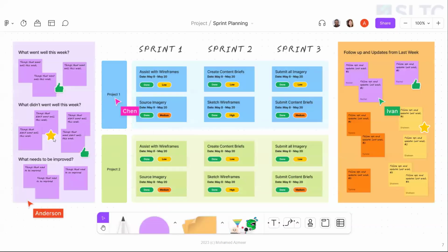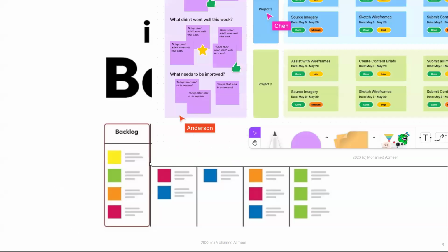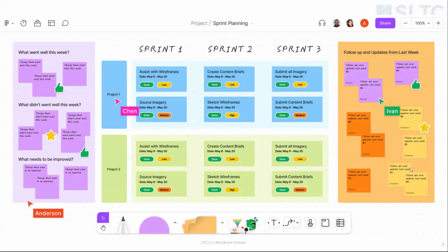Now, when it comes to backlog to to-do, okay, so these two, jumping from backlog to to-do, this is kind of a story that we work on. So what you can see on the left-hand side are the things that we want to sort of pull from the backlog. Yeah. So there are lots of stuff here. There are also things that we discuss after the sprint is over and whatnot. So we take them in and we group a set of features that can be completed within about 2 weeks. It can be actually up to 1 month. So it's up to you.